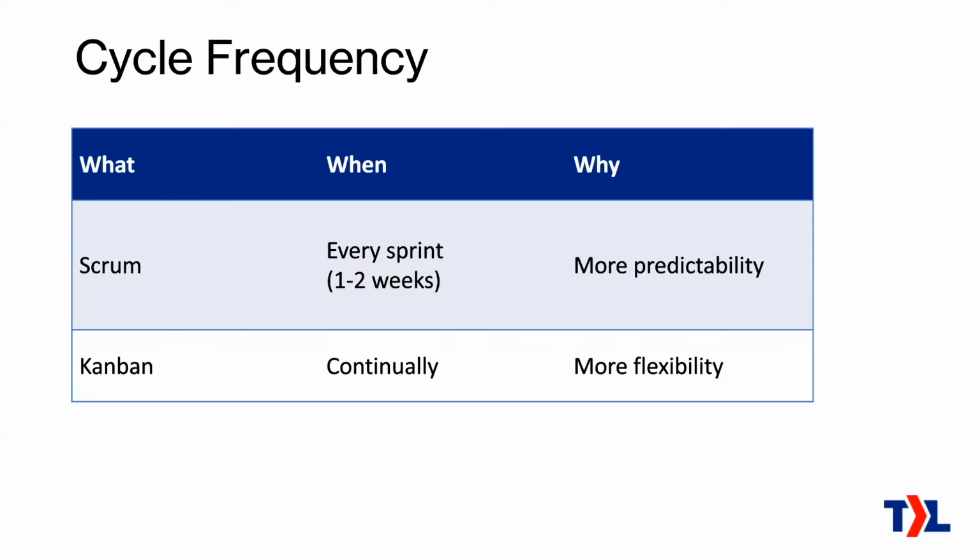Specifically, you might do it if you're constantly being bombarded with different demands, and the demands on the project team are always changing. And that's okay. If that's the environment that you're in and you want to be able to react to that, then Kanban can be really good, because it's totally fine if new work comes in and, for whatever reason, needs to go to the top of the list, and it interrupts everything that you were expecting to do. But Kanban says, hey, that's okay. This is about flexibility and being agile. So that's what Kanban calls for.